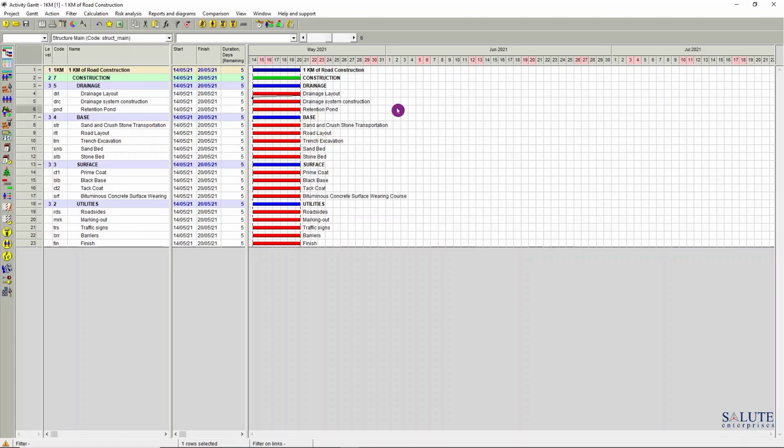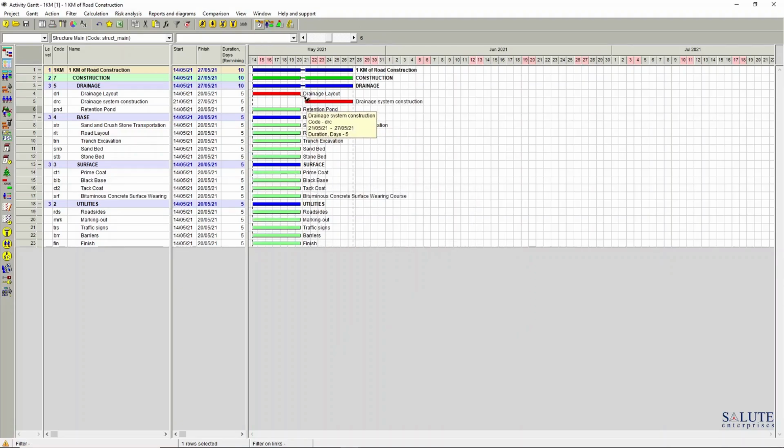tasks together. So to be able to see what it actually does, we can click the simple scheduling button, which is located just there at the top menu bar. And if we click that button, we can see that it's a simple finish-start relationship between the two tasks, and that's exactly what we wanted in this case.